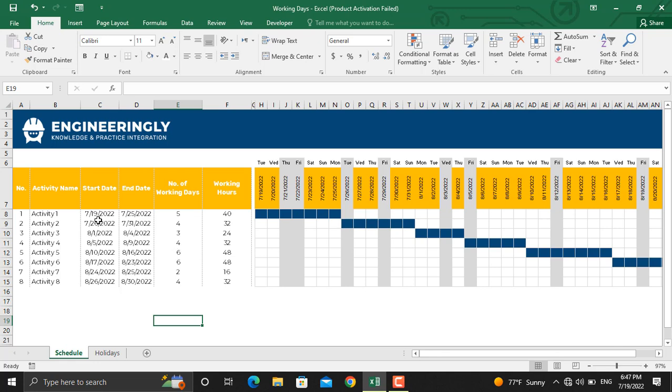For example, if you see the start date for activity number one is 19th of July 2022, and the end date is 25th of July 2022. Since the day of the start date will be included in the duration of the project, so this difference will be seven days, while in here it shows five days.